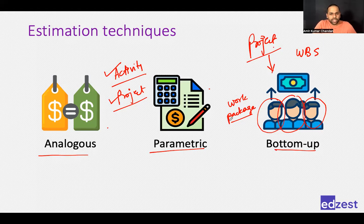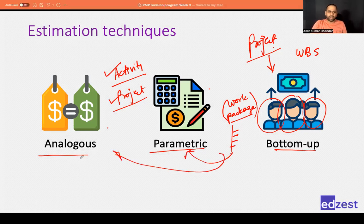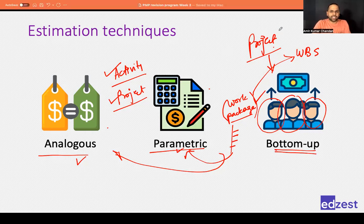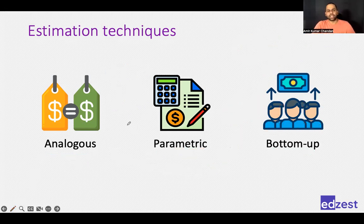Bottom-up estimation is for the project level, not just for one activity. Because you are going to the detail and breaking it down to the work package level, the estimate you get for the project is expected to be accurate. At the activity level within each work package, you can still use parametric or analogous estimating, then add it all up.